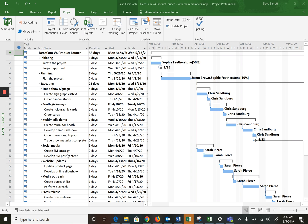In this video, we're going to look at how to change the working days that occur during your project. First of all, let's look at the default of how a project is set up if you don't do anything. On the Gantt chart, certain days of the week are gray and certain ones are white. The gray ones are non-working days — weekends, Saturday and Sunday. The default in MS Project is a five-day work week, eight hours a day, 40 hours a week. Those can all be changed, but generally for most projects that seems to suffice.